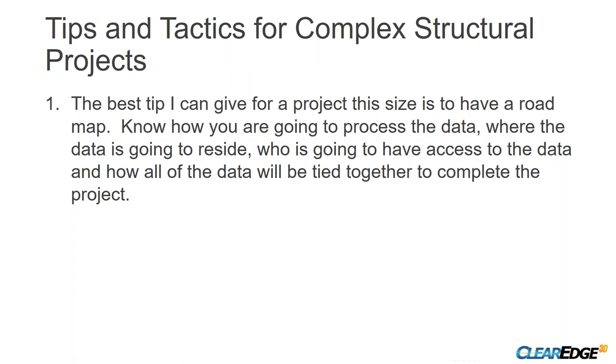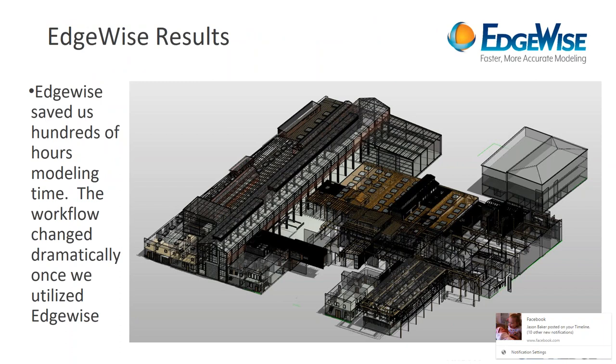And then the thing that we learned about this is when you have close to 1,000 slides, you create a huge amount of data. And when you have that much data, you really have to figure out how you're going to process it, where it is going to live, who's going to have access to it, and why they have access to it, so that you can make sure that you get through stuff. We were originally using Dropbox, and I had somebody that went on and deleted everything on Dropbox. And I was like, well, no longer going to do that.